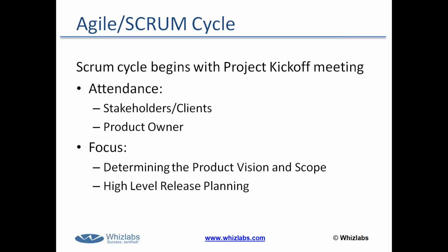One of the differences between an agile project and a waterfall project is that a waterfall project is a lengthy process where there's a lot of planning involved, a lot of baselines get created, and we want to stay close to those baselines. We do not want scope creep, because every time we change the requirements of a planned project like waterfall, it costs us time, it costs us money, right?